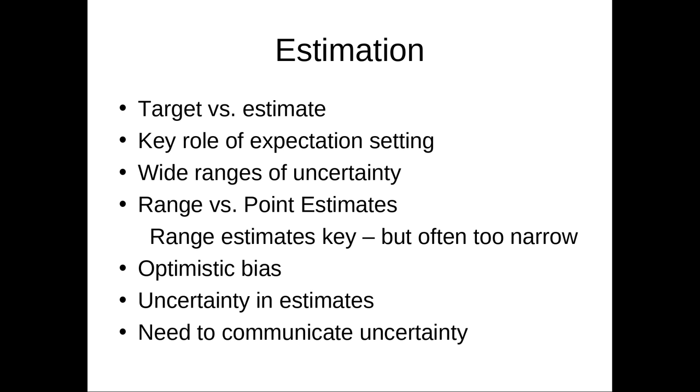Well, we talked about range estimates, and we talked about point estimates. So you write both types, but the key thing about an estimate is that it's a thought through understanding of how long it's likely to take. And it's better if it's in a range, but sometimes it's given as a point. But the point is, it's a lot different from a target. A target is, we'll try to finish it by Christmas. But that's not an estimate. It's like, yeah, we can shoot for that, but it's not based on a really considered analysis of how long this is going to take.